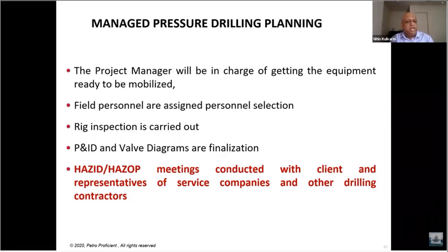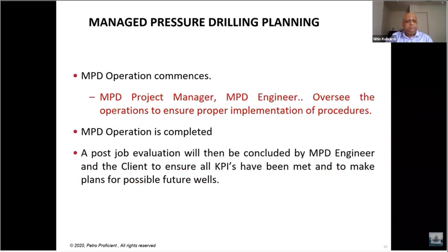One of the planning processes involves conducting a hazard and HAZOP meeting at your client's office, and also involving other service companies who would be present during this operation and the drilling contractor to discuss the various hazards and to make sure that they are properly controlled or mitigated.